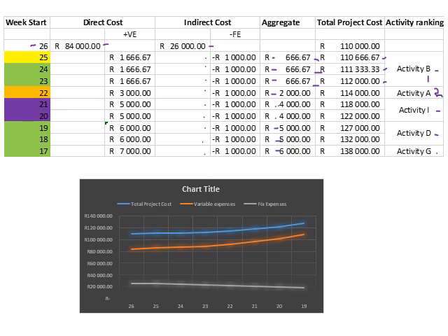Okay, so whenever you're interpreting it, it is a bit subjective on the jump. So we've got a 2,000 jump here, we've got a 4,000 jump here, and here we've got basically the biggest jump of 6,000 Rand. So for our purposes, if you can justify where the jump is, very important how the question was structured.